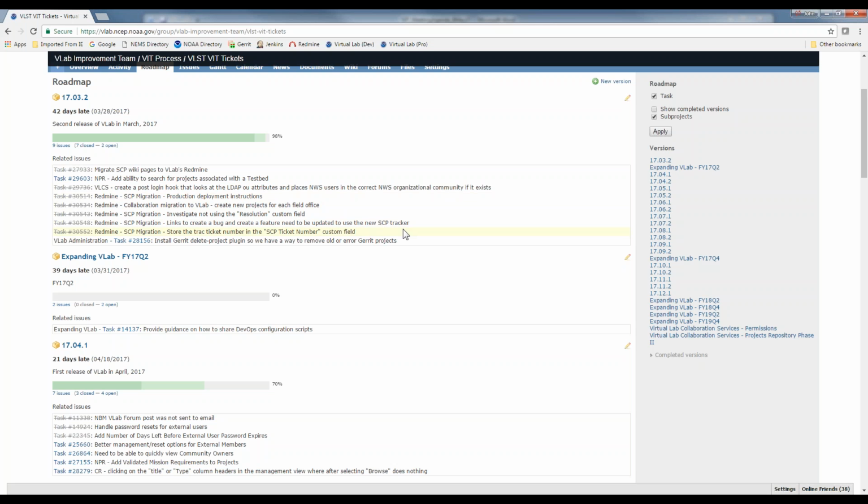One of the things I've been trying to go through and update and shift around, because you can see some of this stuff has taken longer. I'm trying to figure out how to handle it too, because oftentimes we roll out capabilities and 99% of it's there, but because I create an issue that has lots of child issues, the parent issue is held up.